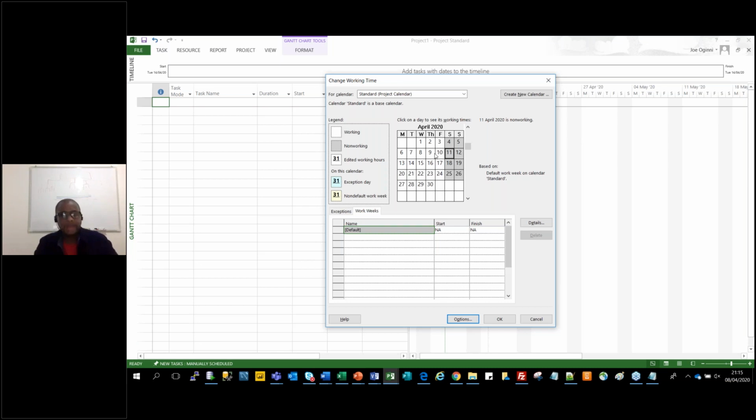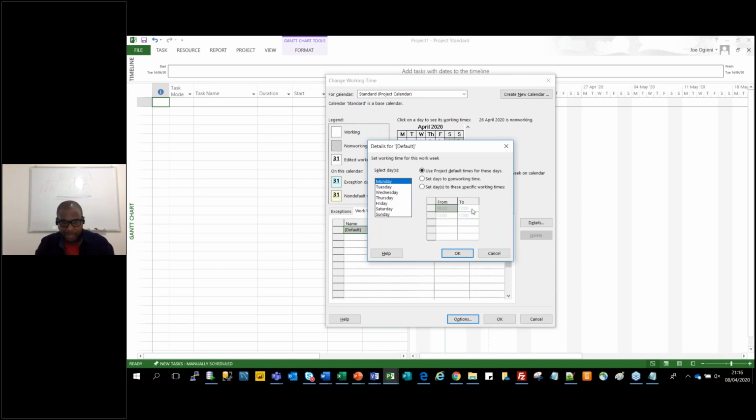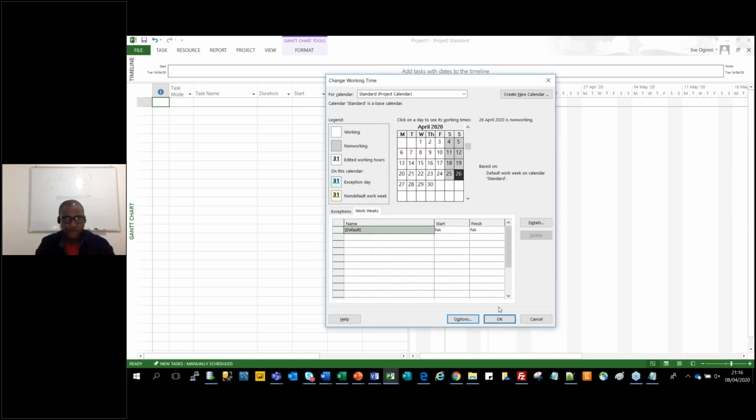Say I want people to come in because of the plan. We're running out of time. I need people to come in on extra overtime to do some extra work, every weekend from the 18th till the 26th. I've got to set up an exception for that, and this is how I'm going to do it. I'll do that here: set up an exception from what date to what date and all that. We'll go into that detail later. I'm just going to show you how you work on creating a project plan. We're not going to set any exception for this.